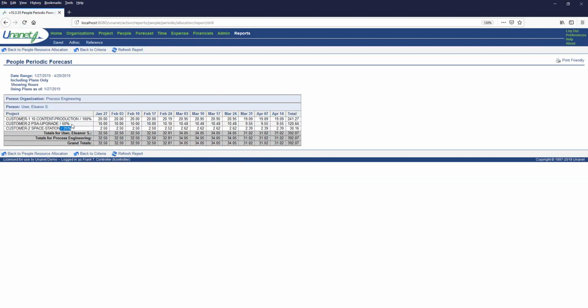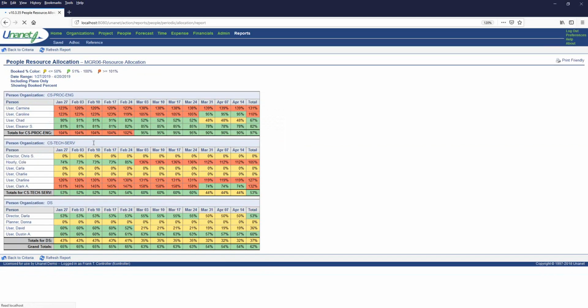And so what I told the system was, go ahead and factor Eleanor's planned utilization by those probabilities. All right. So now I perhaps get a little more accurate representation of how she's likely to be utilized in those future periods. Again, all in real-time data. If I have project managers or engineering managers planning those people right now, and I click the refresh button, I'm going to get the most current view of their future utilization. So perhaps that's, again, a different management level.